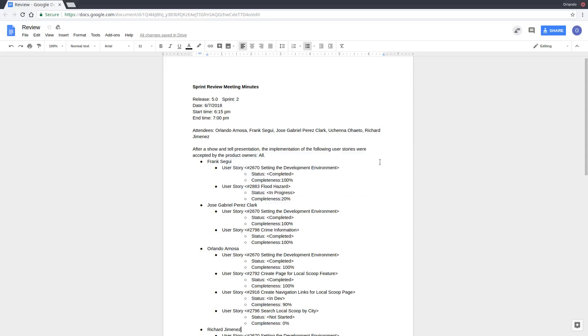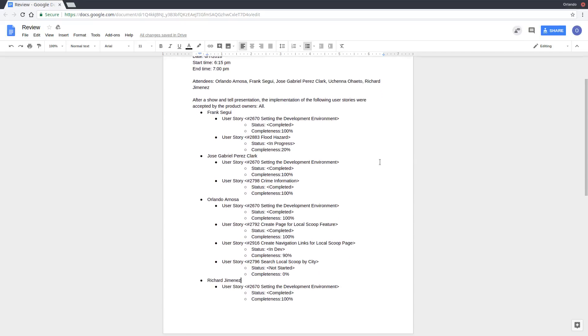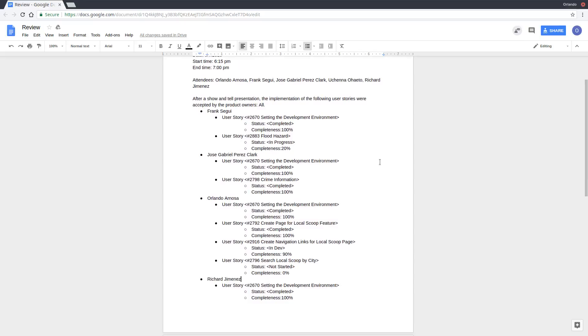This Sprint review was held June 7, 2018. It began at 6:15 PM and ended at 7 PM. For the Sprint, we all carried over from the first Sprint UserStory 2670, which was setting up the development environment. We were all able to complete that.